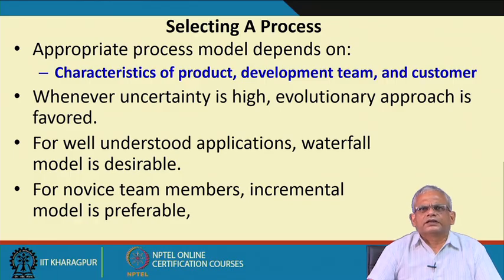But then given a project, can we as the project manager say what is the development life cycle to be used? Okay, but then it is not defined by the project alone. The life cycle model to be used depends on the characteristics of the product, the characteristics of the development team, and also the characteristics of the customer.